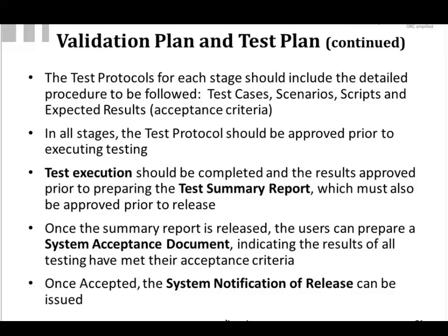In all stages, the protocol for the testing should always be approved before you execute it. And execution should be completed and results approved before you prepare your test summary report. And that has to be approved before you can release the system into production.